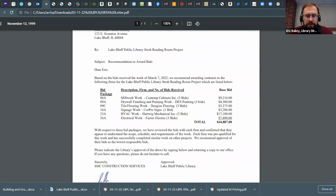Okay, electrical work. So we have 3 bids from that. Jason? Yes, Factor Electric received 3 bids. The low bid is $7,990. We did receive another bid that was closer to $8,000, and then another one that was north of $13,000. So I did sit down with Brian from Factor. We actually have him doing some other projects for us. Some medical healthcare facility projects, and so good contractor, very responsive and very, very capable.